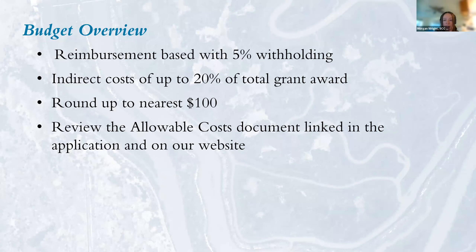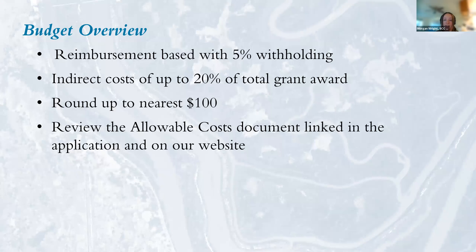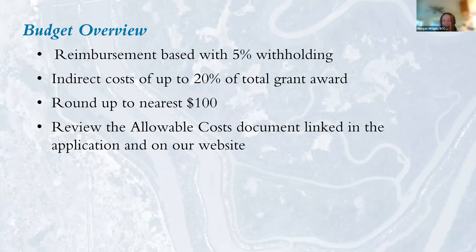The budget section: grants are reimbursement-based, meaning you pay project-related costs up front and submit invoices for grant disbursement. A 5% withholding is applied to each disbursement, released when the project is finished. A percentage of funds can be dispersed up front if necessary — discuss this with your project manager if selected. Applicants may budget up to 20% of the grant total towards indirect costs, and please round to the nearest $100. Refer to the Explore the Coast allowable cost document on the website for more detail.